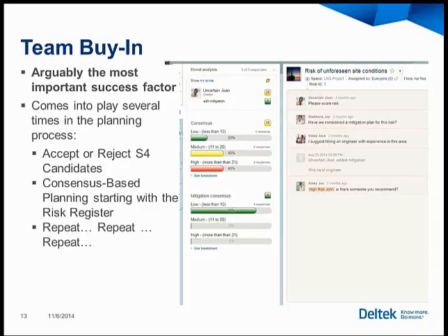We're going to evaluate the achievability using consensus by evaluating risk. It's very easy to say a project can be done in a year. It's easy for an individual with a limited view to say that. Once you start involving the team in the feasibility of a one-year completion, they should be encouraged to bring up the things that would prevent the project from finishing in a year so that we can mitigate them. I don't want people to be yes men and women when that conversation takes place. I want a certain amount of pessimism at the table, and then I want us to work together to mitigate the pessimism. I don't want to mitigate it by not talking about it.